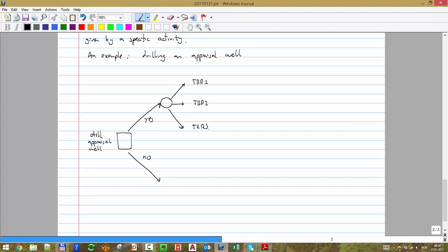And each one of them has an associated probability, and that's in the exercise. That's going to be the tricky part about the exercise. You have to select yourselves what these probabilities are, how I'm going to group them. I give you an extract from a book. I can give you the author later, but he says basically how to do it graphically: you have to determine the range, and then from there you calculate the mode of that particular range.